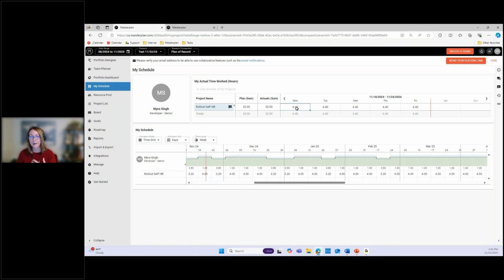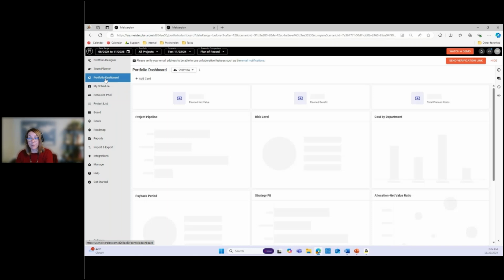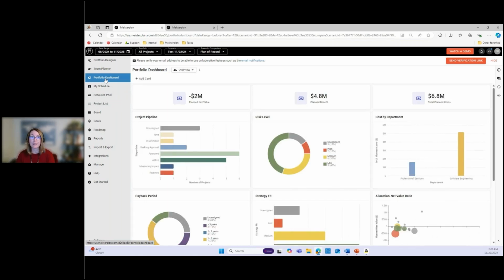Much like the value of story point estimating with Agile, even certain deliverables you can compare: is that bigger than the past project or smaller? By tracking actual time, we'll have these figures in here that we would be able to compare. That actual time is available in reporting and also available in dashboards.